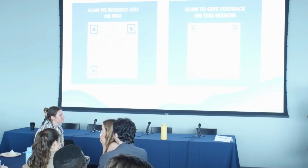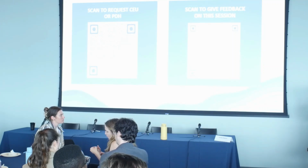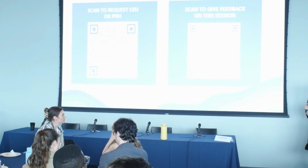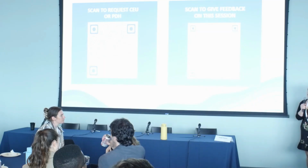And what we wound up doing, to be very responsive to the community feedback, was that we actually increased the main lawn of the park to bring it close enough to the level of the previous square footage, which was really in response to the fact that when we looked at it, we really did not provide the same amount of green space. And obviously people wanted green space. They didn't want concrete. They didn't want it to be an amphitheater. They didn't want it to become something that wasn't a park. So that was something that was directly responsive, I think, to community feedback.